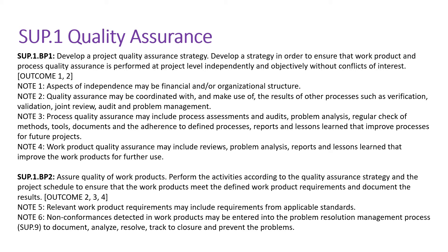BP2 talks about assuring quality of work products — perform the activities according to the quality assurance strategy and project schedule to ensure that the work product meets the defined requirements, and document the results. In BP1 we defined a quality assurance strategy; in BP2 we are executing that plan. When we execute it, we will see some compliances and non-compliances. At that point we have to document, analyze, and resolve the identified issues, track identified non-conformances to closure, and prevent problems in the future.